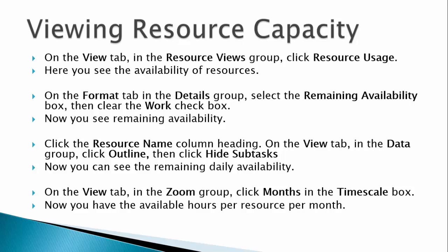Following the steps on this slide, we can modify the resource usage sheet to show us the remaining availability of resources on a month-to-month basis. This will be useful for determining our resource burn rate, the rate at which we are consuming project resources. This is also useful for determining which resources might be underutilized and available for other project tasks or tasks on other projects.